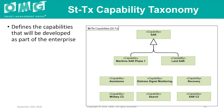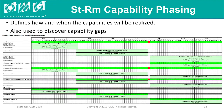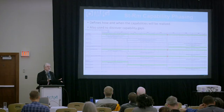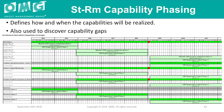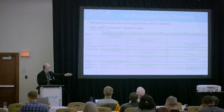You can say what are the different capabilities and what you're trying to achieve. Going back to the time theme, you can also specify when capabilities will be realized or deployed, by what systems, who is responsible for them, and what capability metrics will be achieved by each phase. You can also see capability gaps — red points expressing where someone specified a project schedule and what systems will be deployed when they come online and offline, but there's a gap where there's no overlap. If someone's in trouble at sea during that gap period, they're going to get very cold waiting. So it's important to define and close these gaps.